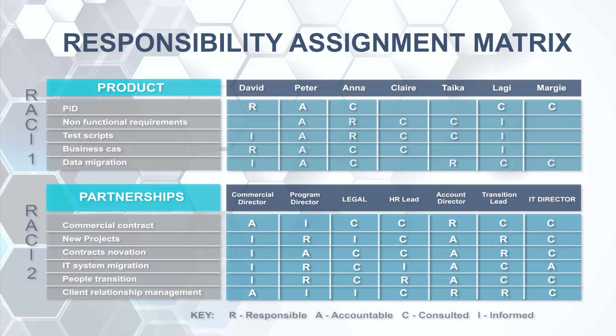In RACI 2, the commercial director and account director have shared accountability for signing the deal, achieving innovations and rating the partnership for new business and new projects. Each other director has signed responsibilities for areas within their specific domain — HR, IT or legal. A strategic RACI like this will be used for board level communication and will almost certainly have more detailed RACIs sitting behind it in the detailed implementation plans. The important takeaway is that you can apply the RACI technique in many different circumstances to help achieve many different goals.